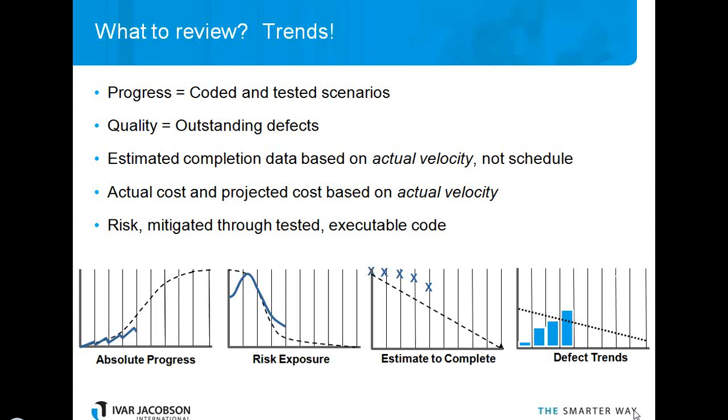Risk exposure, similarly, we'll talk a little bit about how to measure this later on. We've also got some webinars and white papers on this as well. But the risk exposure, basically the cumulative magnitudes of all the risks that you're facing, magnitude being probability times impact for the risk, plotted over time.